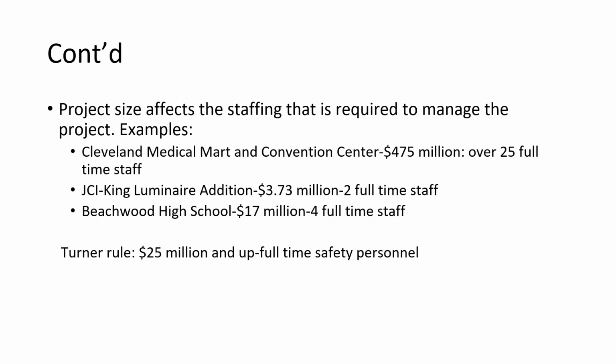Project size, again, affects staffing. Cleveland Medical Mart, $475 million, over 25 full-time staff. JCI, that project, and the reason I say two, I just told you one before, it was me and an intern, and I had him for a couple months. All right, Beechwood High School was only $17 million, had 4 full-time staff. Project size was small, but scope was really unique. Turner's got a rule, 25 million and up, full-time safety personnel.